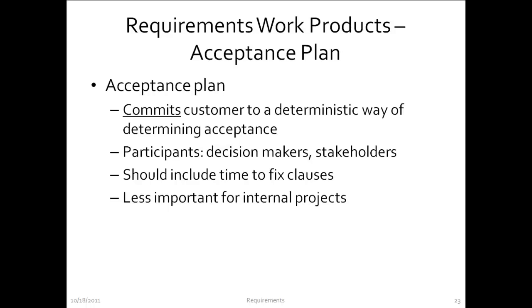Okay. Now, a couple of things with respect to the acceptance plan. The acceptance plan is done jointly. It's not done just by the development team. This is because when customers are actually asked about how they will test the system, they will be more precise in giving the requirements in the first place. And secondly, this is meant to be a collaborative effort. It's not meant to be an adversarial effort.